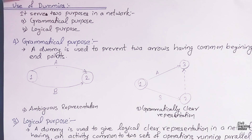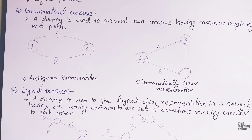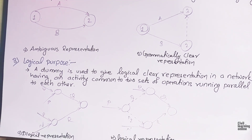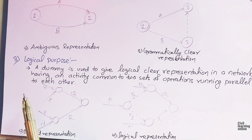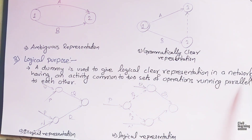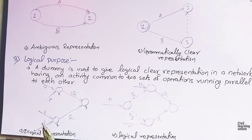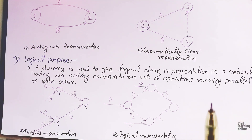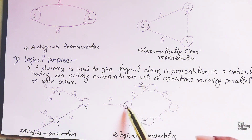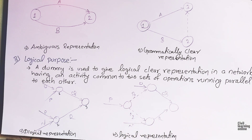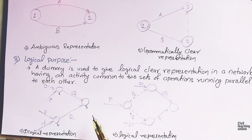The second purpose is the logical purpose. A dummy is used to give a logically clear representation in a network having an activity common to two sets of operations running parallel to each other. For example, a common activity P terminating at two different events is redrawn as P1 and P2 with a separate dummy activity P, splitting it into two sub-activities. This is how we represent dummy activities in the project network.